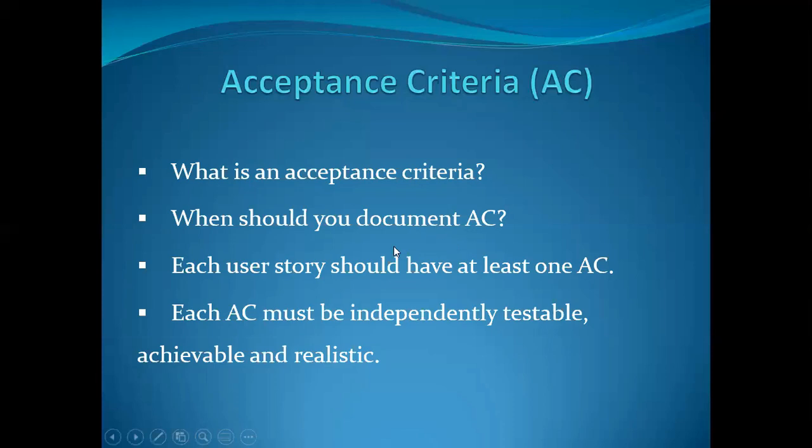Each user story must have acceptance criteria. Imagine you're trying to test a particular user story. The stakeholder may not test it, but at least you write acceptance criteria for each of those user stories that you've listed. Each user story can even have like three acceptance criteria.